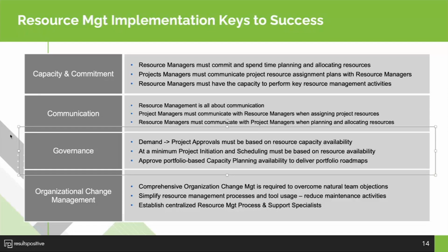Or you may still have the same number, but have different sourcing channels versus just internal resources, so you can get the same amount done. And that's really a function of providing the right visibility. If you can provide visibility on what the resource needs are, you can deliver your roadmap and not get to the end of the year and say, oh, we weren't able to accomplish things because we didn't have that capacity. We need to factor that capacity into those upfront governance decisions.